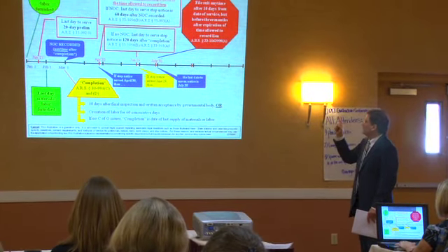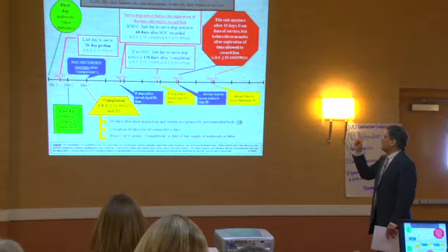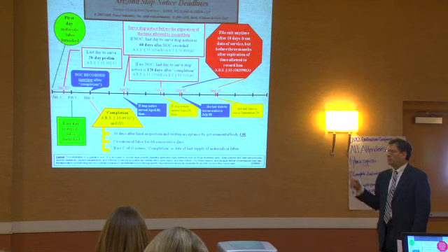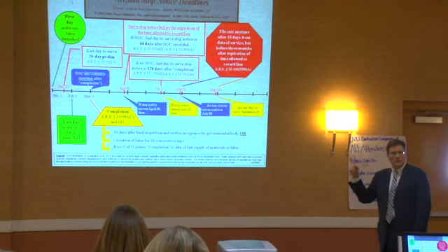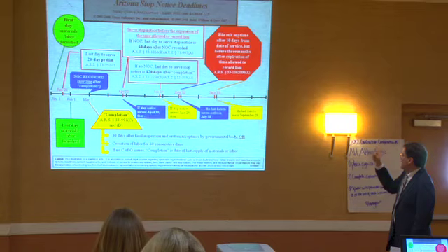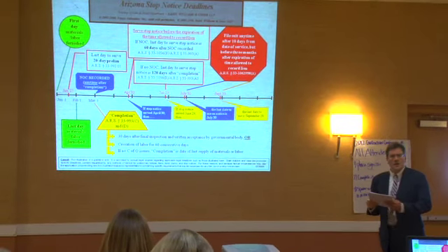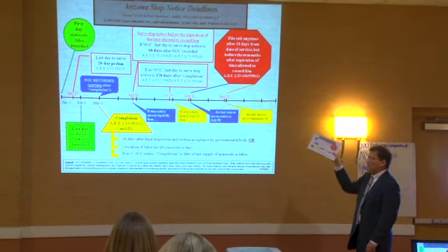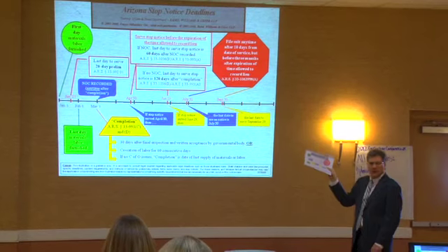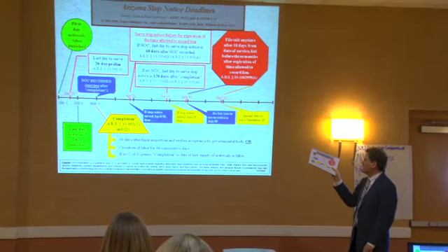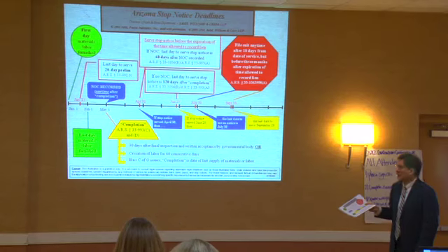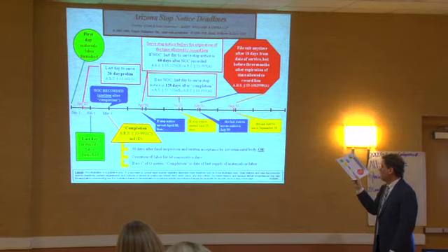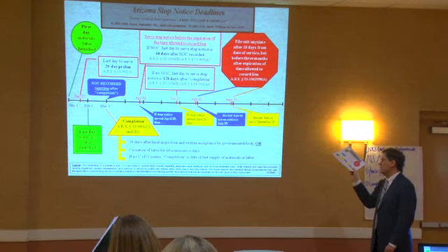All right? Now, if there's no stop notice served, then June 29th was your last day to record a lien claim, and therefore your last day to serve the stop notice. 3 months after that is your last day to sue on that stop notice, and that's September 29th. So, the only thing that's changing here in this hypothetical are the legs on the stop sign. Those legs shift to the left because you're dealing with a 3-month period. In the lien claim timeline, those legs shifted to the right because you're dealing with a lien claim 6-month period. All right?